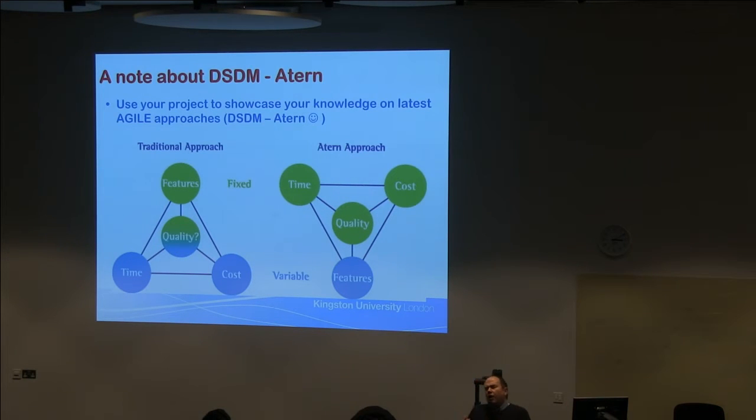But Agile is the current kind of in thing. Agile involves an iterative process. So all the Agile methodologies have this in common. The idea that you do a bit of work, like development work, and a prototype comes out at the end of that development work. And that will be a small little bit of functionality of a system.